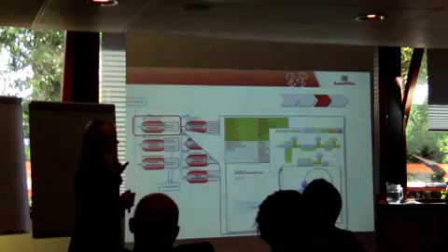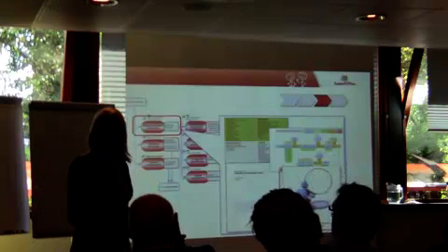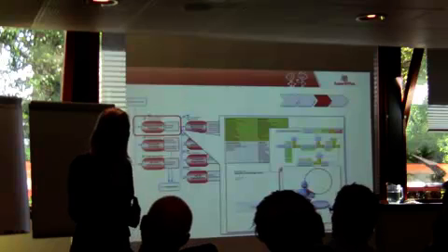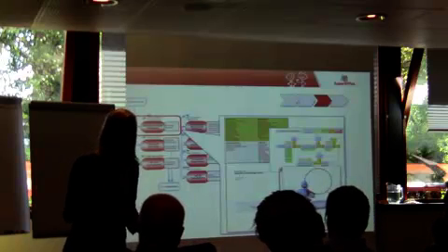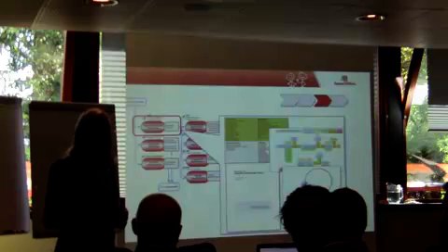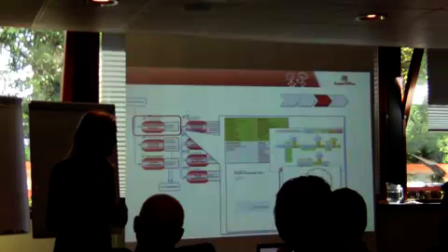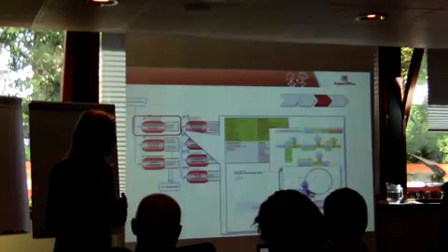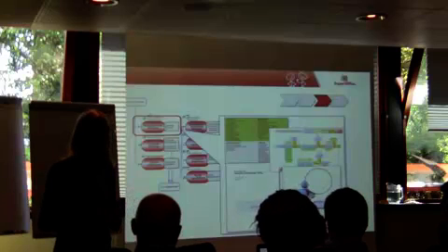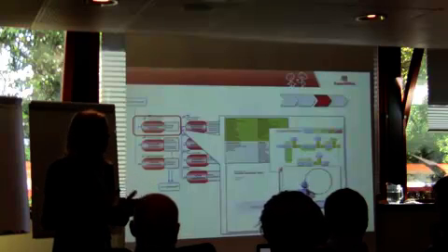And this is quite important also to understand that if we should be able to transfer knowledge to the customer, we need to spend time with them. If you look at, for example, an offer and you see that there's a number of technical activities, installing and importing and setting up Exchange Sync, etc., and they are maybe one day on-site configuration, we spend very, very little time together with the customer discussing their business, which also makes it very difficult for us to give them advice on how to set up SuperOffice to be able to support their business. So the time that we spend together with the customers is critical.